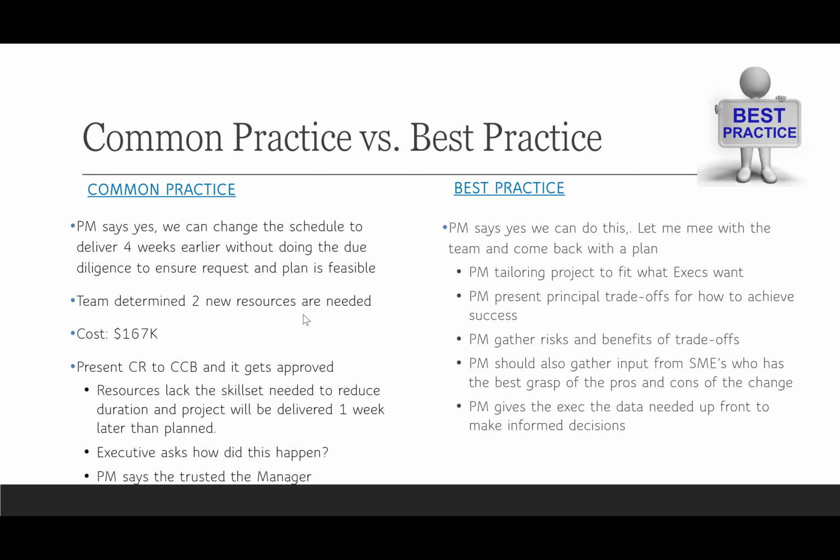The PM should also gather input from SMEs, not just your team, but you should also reach out to the SMEs. So in this example, since this will have an impact on 26 of the company's large group accounts, maybe he wants to talk to somebody in sales and account management, someone who works very closely with those large group accounts. Run the change request by them just to make sure that it's feasible and to get any thoughts and ideas around if there are any risks, how can we get past those risks, as well as what are the benefits of going with this solution.